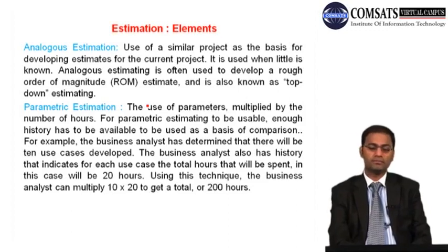We think, okay, we had developed one software and the cost was like 500,000. So now we are developing software, so the cost will be like 500,000 because the same team is working over there. So this is very rough, and accuracy may range up to plus or minus 35%. Now that is huge.